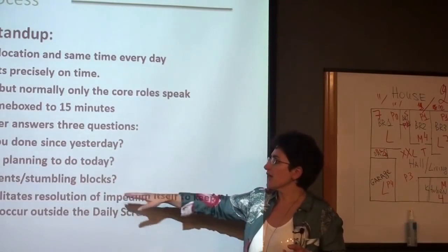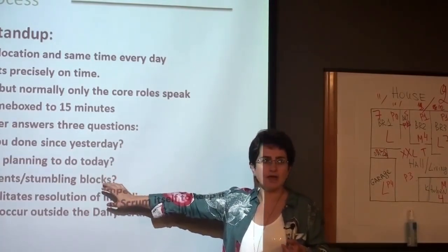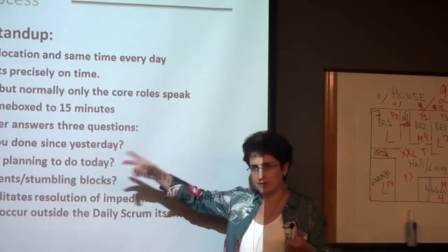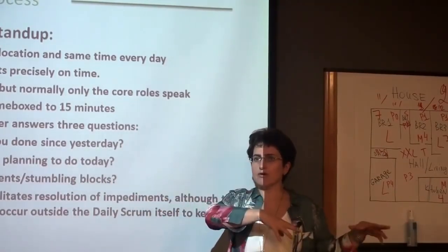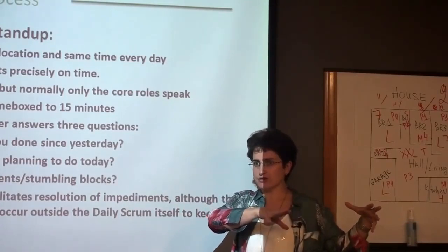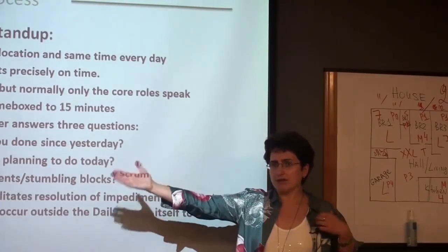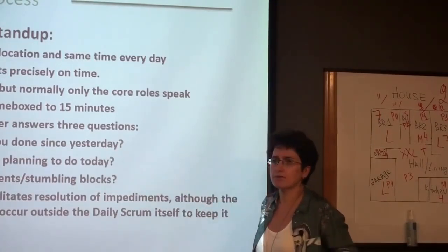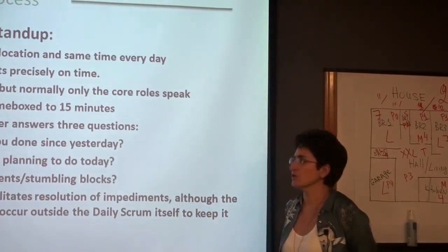And of course, if you are blocked on something and you need to resolve that problem, that does not need to be discussed in this daily stand-up. You can take it offline with the Scrum Master and find the solution and unblock other people. They are not blocked. You are blocked, you will find your solution with the Scrum Master, but the other people will go back to their workspaces and continue working.